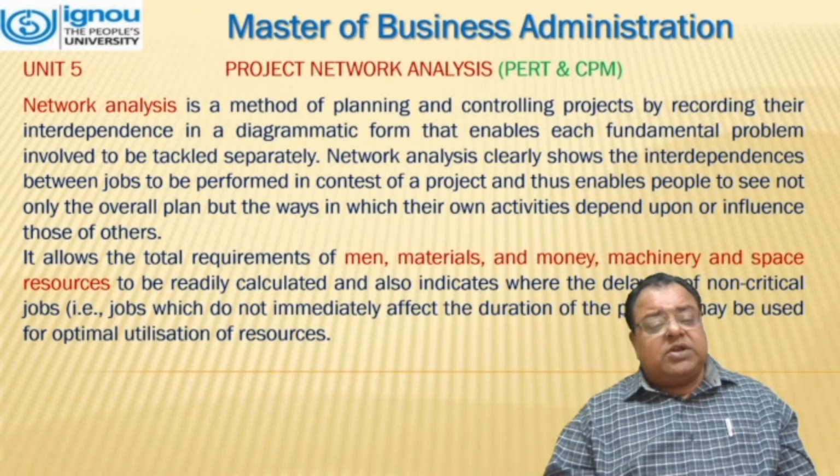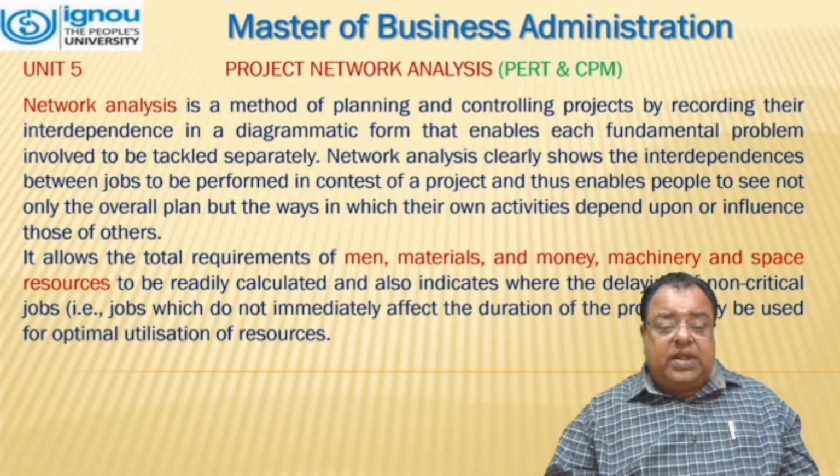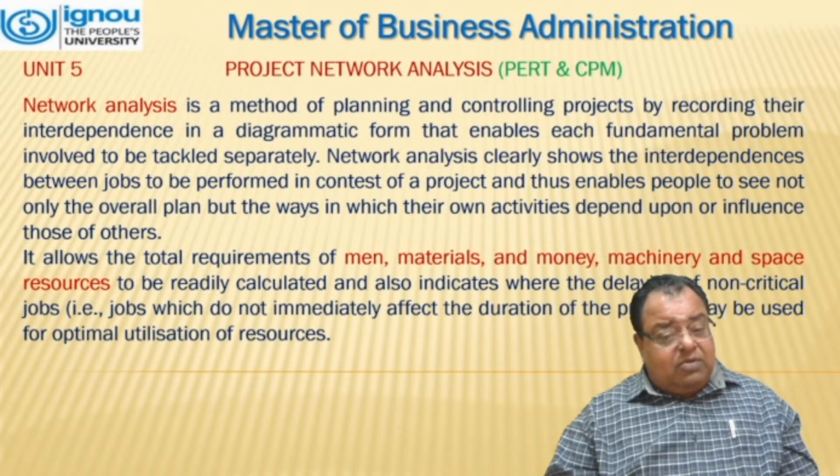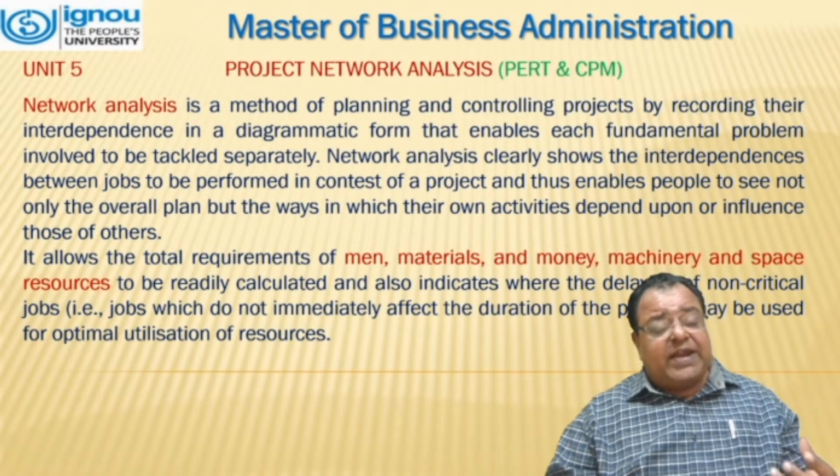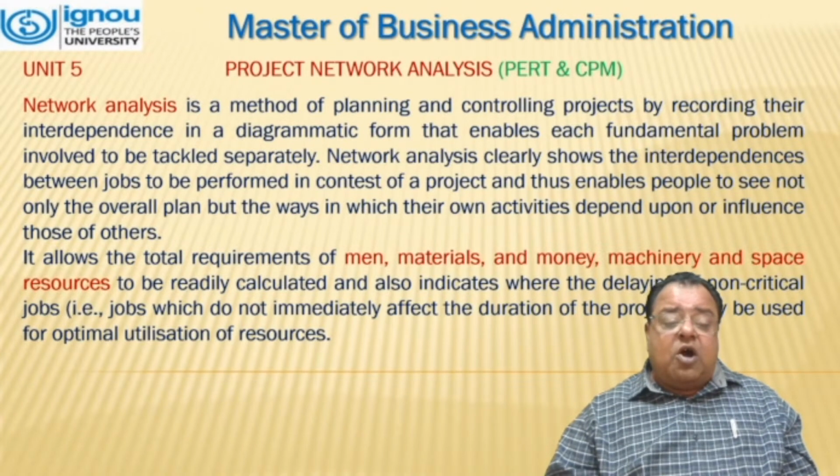It allows the total requirement of man, material, money, machinery, and space resources to be readily calculated and also indicates where the delaying of non-critical jobs, that is, the jobs which do not immediately affect the duration of the project, may be used for optimal utilization of resources.